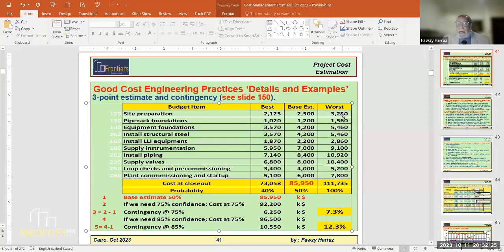But with this quite preliminary or limited basic design in this infrastructure, airport or hotel or whatever, no contractor will agree to bid a lump sum because the unknowns are quite much.